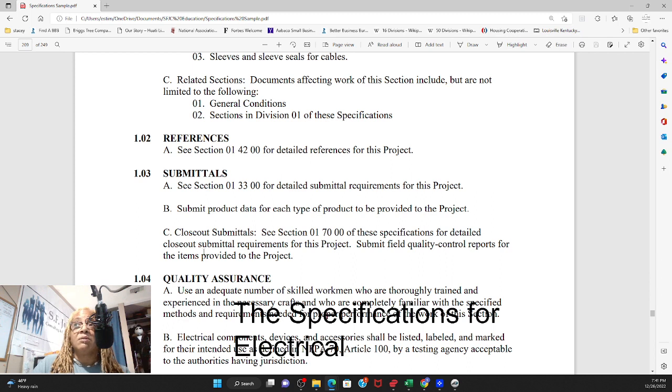And this is a very good example of what my specifications and submittals class shows. What are submittals? Submittals are information we need to submit either to the architect or to the engineer, based on whatever section 013300 is telling me to do.